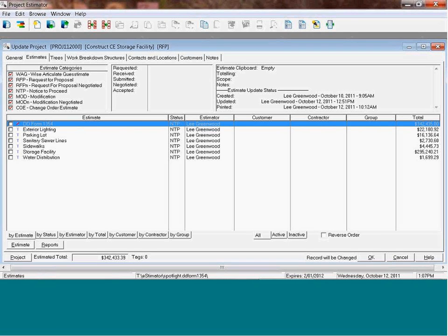We want to say that it's extremely important that you meet with your government people and the real property team and find out exactly what they're looking for in the finished 1354, because there's no reason to put 75 line items inside when you could have broken those down into 5 or 6 major ones with units of measure of linear foot or square foot or quantities or whatever they wanted to do.